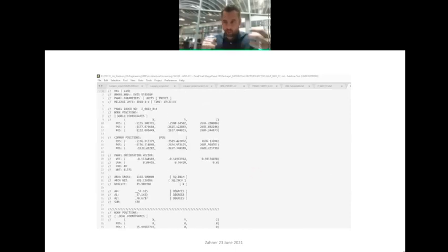Another thing to note: this is a layout of a large number of the triangular skins. If you note the sheets that these are laid out on, this is a nesting study. The sheets are not rectangular. They're actually cut into a parallelogram shape. So this is where, if we get involved early, we can optimize the sheet ordering to minimize fall-off, minimize waste of material by pre-nesting.